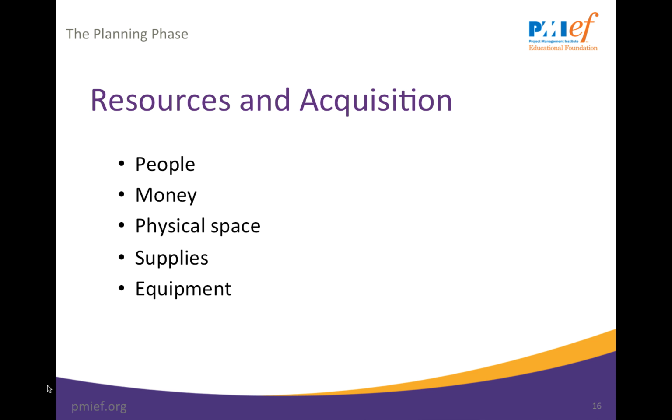Will the resource require you to allow elapsed time in your schedule? If you have some pressing deadlines, you can trade off time for money in your budget, for example. While you consider your resources, again, time, people, supplies, funds, you will also be determining where or how you will get what you need. This is called procurement.